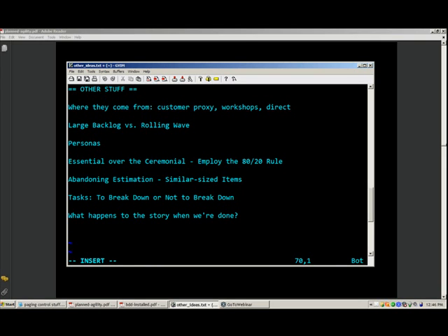By task breakdown, I mean the notion that during iteration planning, we're actually going to break down our stories. What we've found is we may end up with 3 or 4 stories in our iteration. We keep pulling stories in as we need. We break down when we go to work on a story. Let's say we've got 5 stories and we've got 3 pairs working on it. Then we'll only break down those 3 immediate stories. So kind of just-in-time task breakdown.